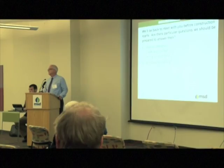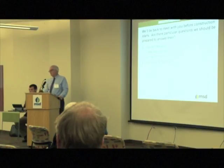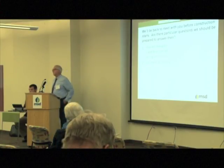Anything else, Justin? The bicycle and pedestrian trail, the contractor should be ready to answer how often and how long the trail will be closed during the construction, and what time of year. Obviously, summertime is used more often than wintertime, but that may be when they need to close it. But how often, and how much advance notice? Gotcha. All those questions: duration and times for trail closure, signage, how notified. Okay, that's a great question.